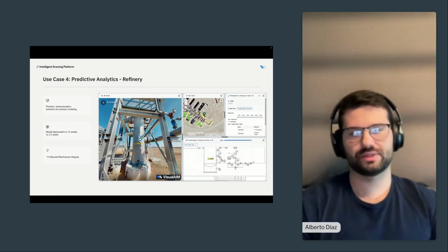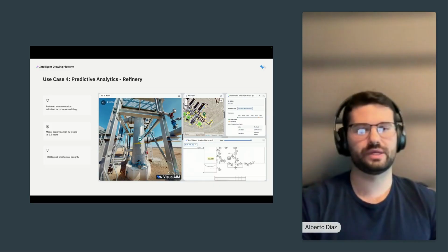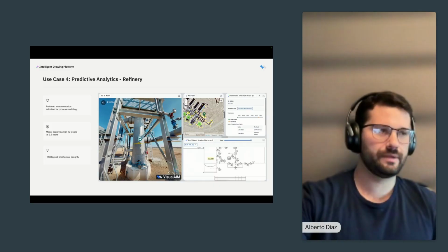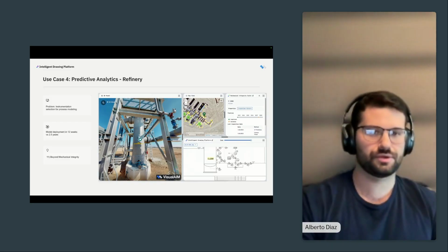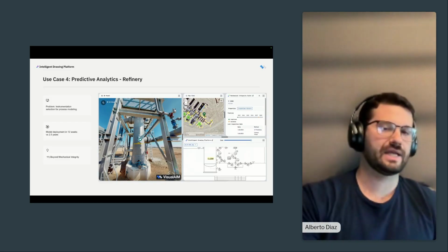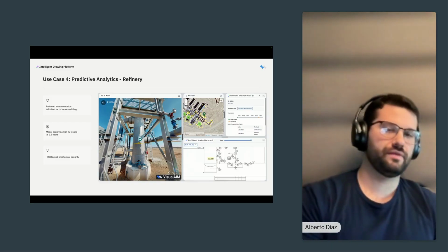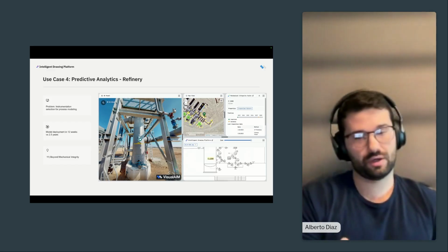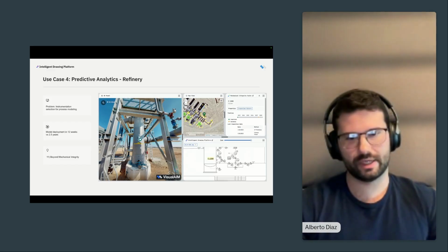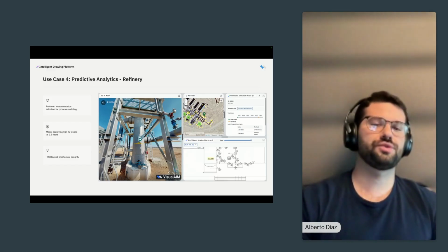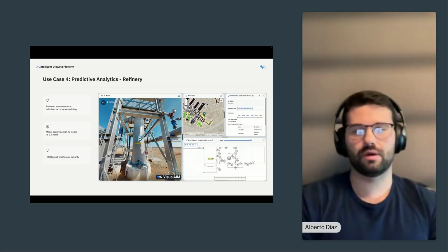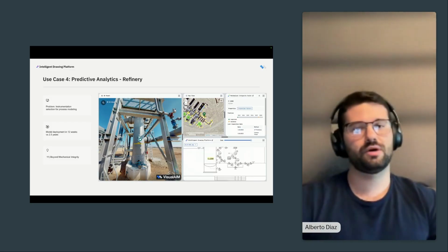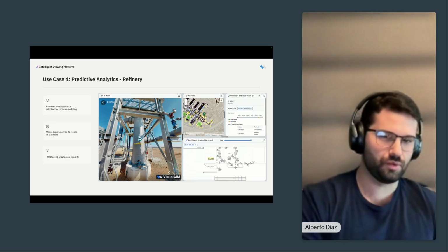One example that we always give for this is scaffold measurement. Say that this facility is located in a remote area and you need a contractor to go and do a particular task at this site. It would be very cost ineffective to have them go on site prior to doing the work so that they can measure and scout the area to understand how they're going to approach the work, increasing the cost and the time for the execution of the work.